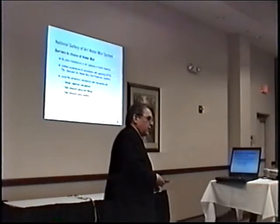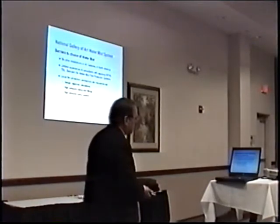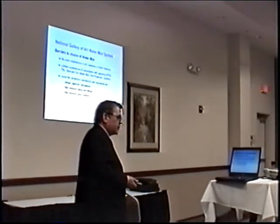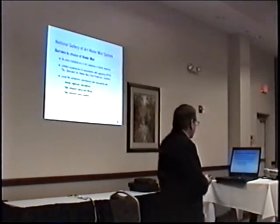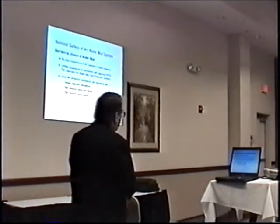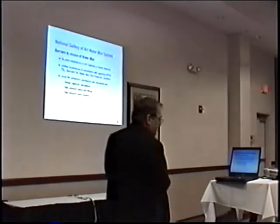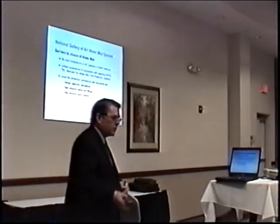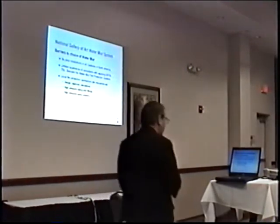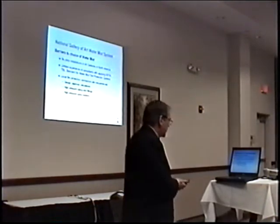There's limited experience among the fire protection consulting community in designing water mist systems. There's been a lot of talk of it, and articles written on it. But who actually knows what they're doing and can actually come up with the design? Well, of course, we had used to fill that one. Local fire protection is inexperienced. You can't go to the local contractors and get your standard design-build situation. Ordinarily, you can rely on sprinkler contractors to do the design, ongoing calculations, get approvals, and completely understand every aspect of the job. That's absent. Who's going to bid this job, who's going to actually install it, who's got the skills to do this?